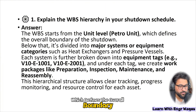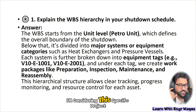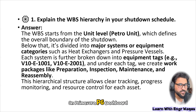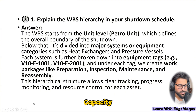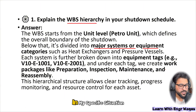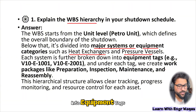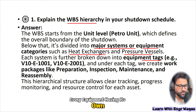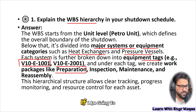The WBS starts from the unit level — the 'Petro Unit' — which defines the overall boundary of the shutdown. Below that it is divided into major systems or equipment categories such as heat exchangers and pressure vessels. Each system is further broken down into equipment tags; for example, there may be five heat exchangers and six pressure vessels, each having its own unique tag. Under each tag we create a work package, such as 'Preparation.' That is our hierarchy.